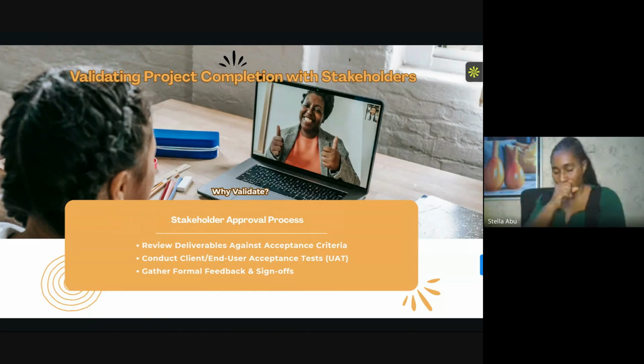If at the end of the day, the webinar, you are not able to get farmers, and you try to get teachers, when I'm reviewing your deliverables, I'll tell you, you failed, because the project charter or the scope is saying we need you to get farmers, train them, put them into a mentorship group, ensure that you open a wallet for them, give them funding. When you give them funding towards the end of the project, ensure that it creates impact. They're able to buy more crops, increase their product.